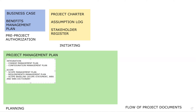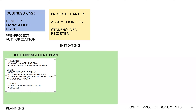The scope statement is a document that defines inclusions and exclusions, a detailed deliverable description, and sometimes the criteria for accepting that deliverable. In schedule, we have our schedule management plan and our schedule baseline. The schedule baseline is a version of the schedule approved by management — a snapshot in time. Anytime you want to check team progress, you go back to the baseline. This is different from the project schedule, which is a living, breathing document updated regularly throughout the project.